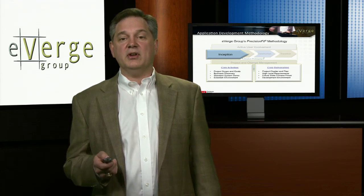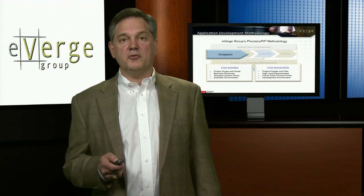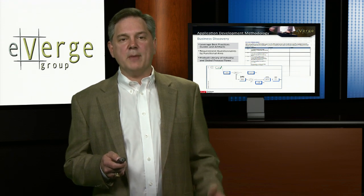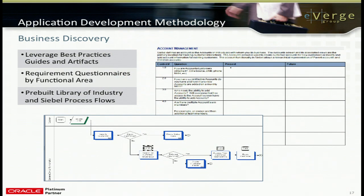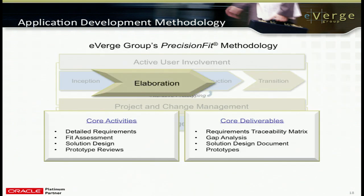Each of those core activities has a matching set of deliverables that are delivered and approved by our clients as a function of the phase. As an example of business discovery, we go into a project with predefined processes in many of our practices — based on the custom off-the-shelf software we deliver — and predefined templates with questions to provoke the requirements we'll eventually capture. The next stage is elaboration, where we do detailed requirements gathering and try to solidify those requirements. We take those requirements and do a fit assessment and gap analysis to compare how they'll be met with our standard delivered software functionality.